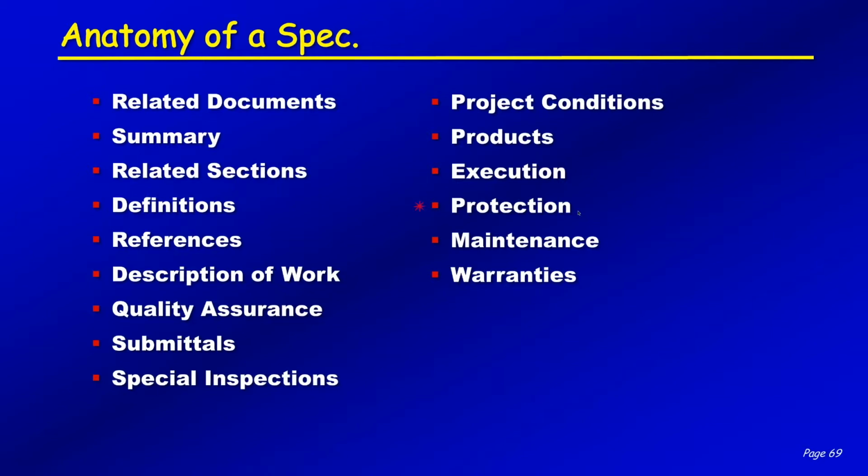Protection, I want to go back here. I tell my subcontractors, you better make sure you understand that very, very well, because if you don't understand how you're going to protect the job when you're done with your scope of work, they can actually make you protect it the entire time until the job's turned over to the owner. Of course, maintenance and warranties.